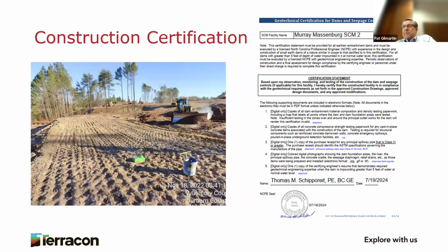And that's going to take that the materials testing firm coordinate with the project team to observe and test them for compliance with the project civil drawings. For example, the city of Durham does require a certification form prepared by the geotechnical engineer with testing reports, photos, materials submittal, and the geotechnical engineer's resume attached.